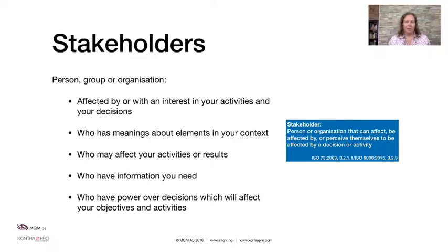My suggestion is then that the stakeholder perspective and the context perspective needs to be seen in connection to each other. Doing one will help doing the other. So you can first map the context, and then from the context you will get a list of stakeholders. When you have the list of stakeholders, you might even have included some more than those who represent the context that you've been able to describe. And then you can go back and improve your context description. And then you have a sort of an iterative process that keeps being more useful and specific.